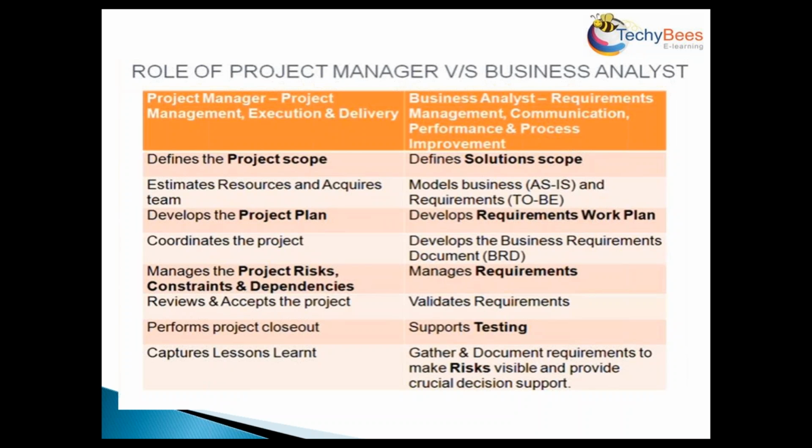What if 10 team members quit after the appraisal? What's going to happen to the project? Is it possible to get people from bench and train them within 10 days? Get them to work like whoever, the people who have put on their papers and worked out. So it's the project manager's responsibility to always have backup. Without backup, it is a big risk to start a project.